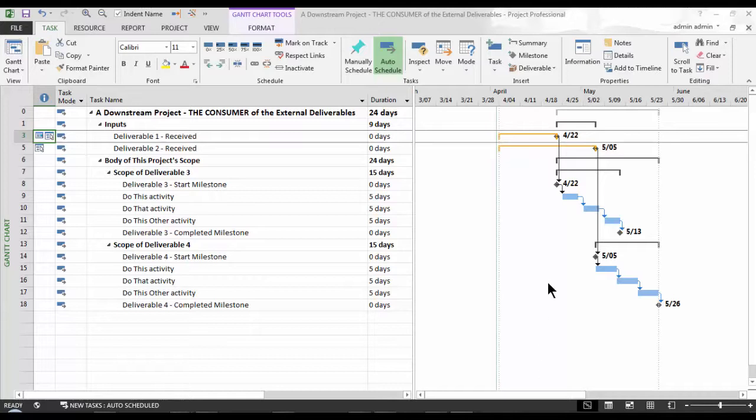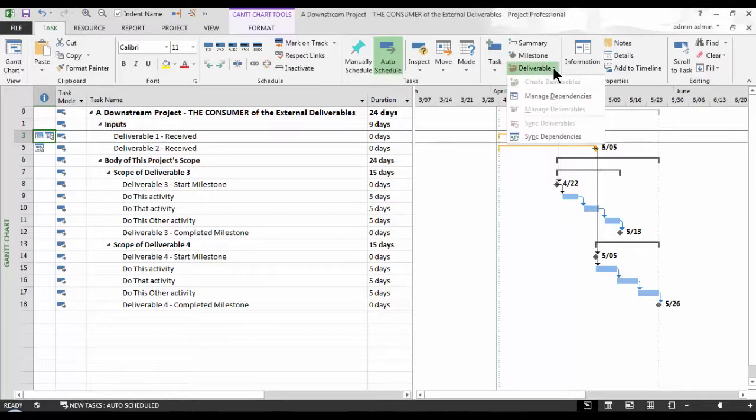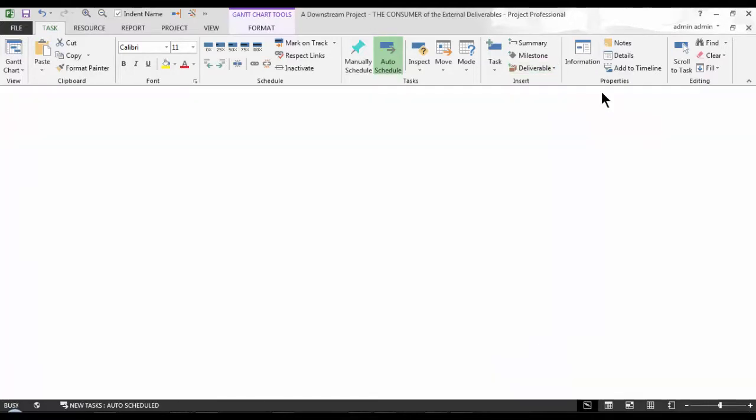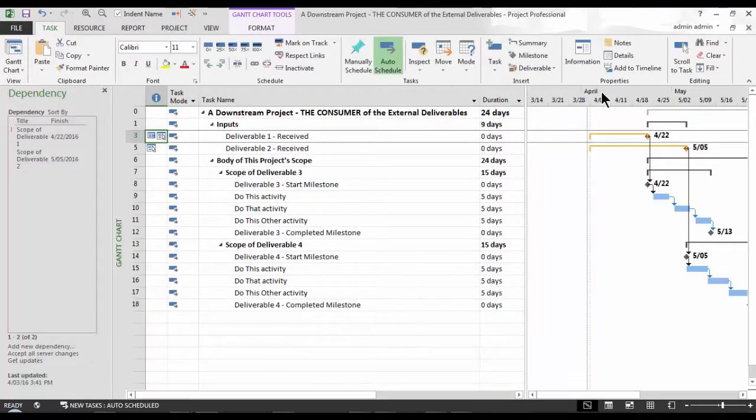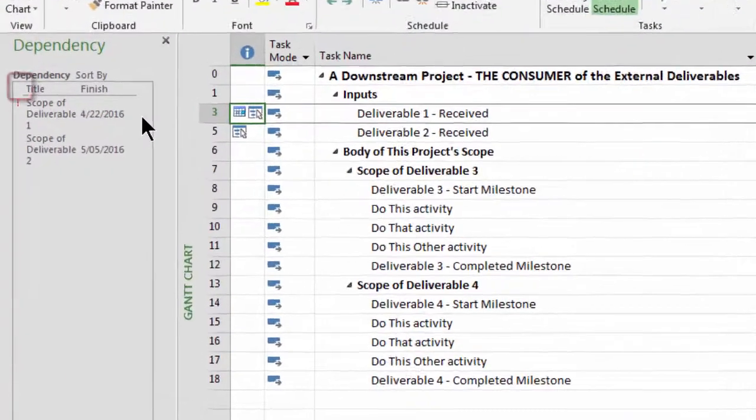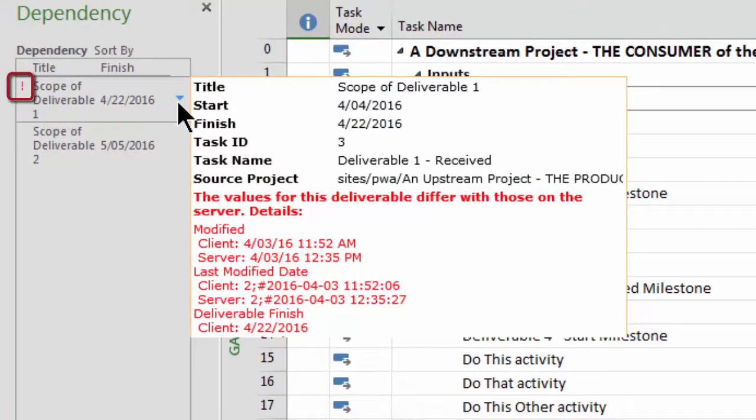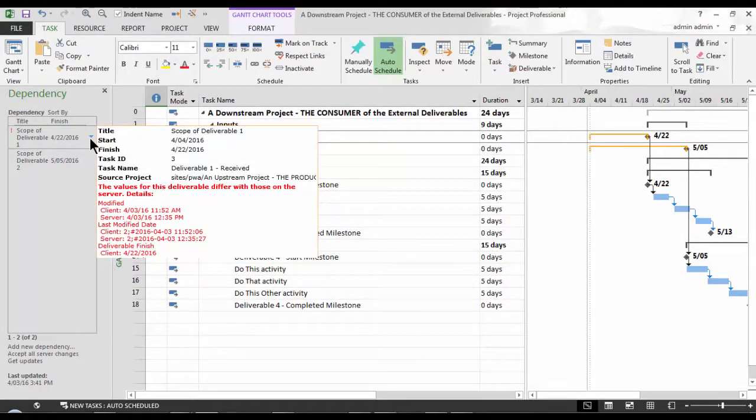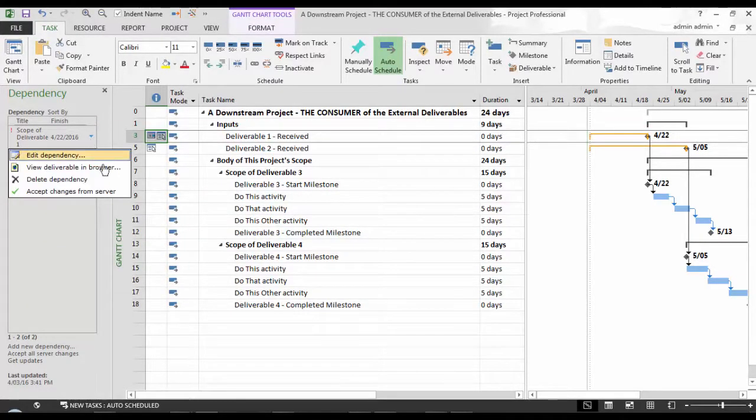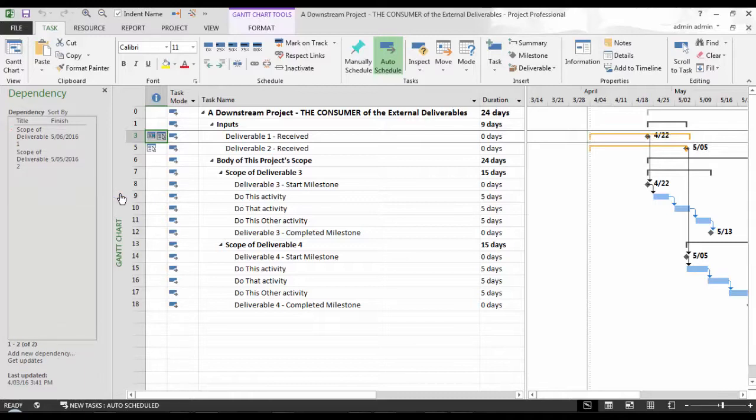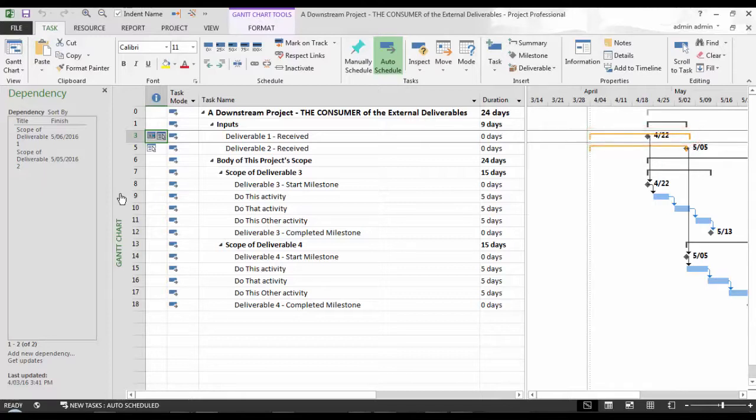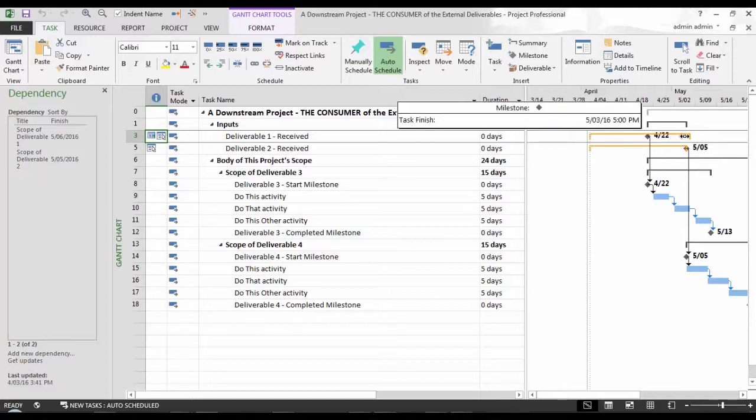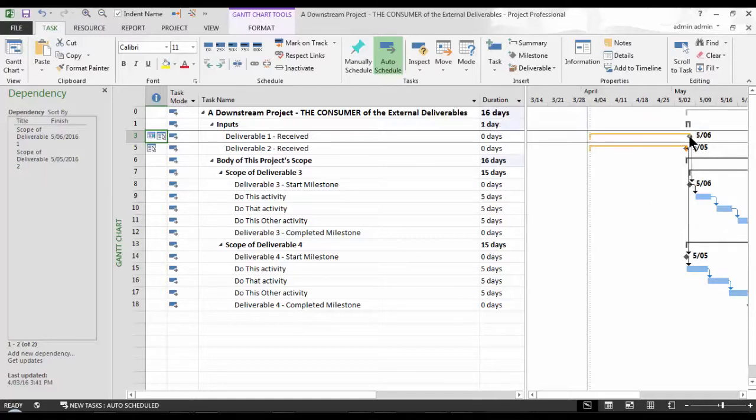I've opened my downstream consumer project here. I can assure you I did not get the link to project dialog opening up automatically, because as you remember, this is the configuration change I made and I desire. So now, let's act on the notification about the deliverable change. To do so, I go to the Deliverable drop-down once again and choose Manage Dependency. Here, I am alerted as well via the exclamation point to the left of the deliverable name and hovering over the deliverable will provide me its status and changes. Before I make the change, notice that my schedule has not changed. Deliverable when received has a milestone on April 22nd. Now, I will go and click Accept Changes from Server. As soon as I do this, the orange line representing the deliverable finish commitment date has been updated to reflect May 6th. Notice that the milestone did not get updated. There is no physical dependency between the task and the deliverables. This is why I call deliverables soft dependencies.